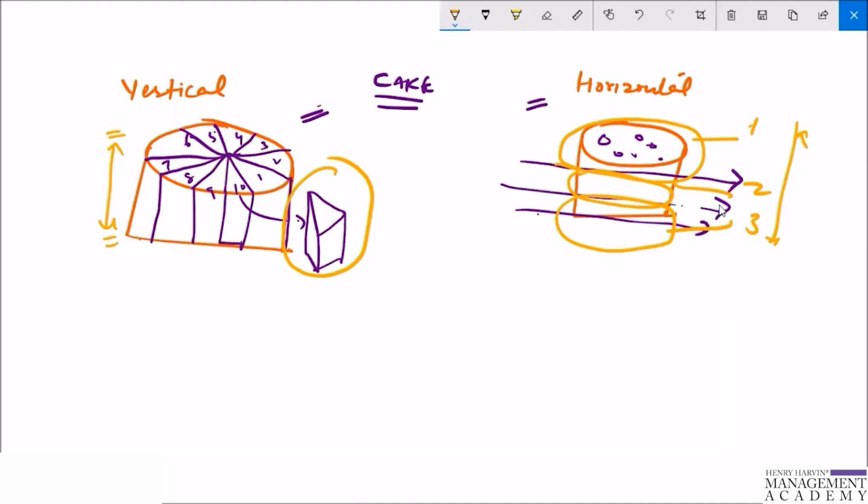So if the team members are not interchangeable, there is a good chance for a bottleneck. If the design guy can't get his work done on time, this will impact the tasks that follow the design, because team members can't help each other out. Every delay, problem or interruption will impact the entire sprint.